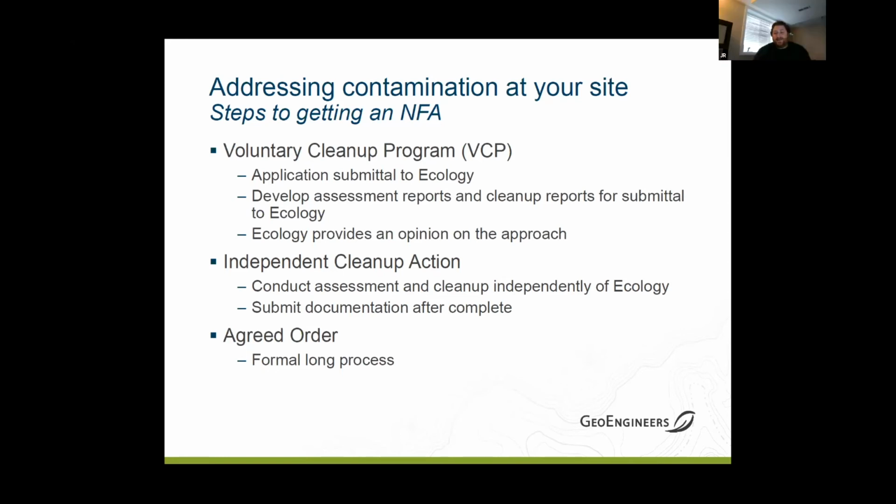Well, access to that other property can be an issue, and hopefully that's somebody else's problem, and that's over there. If that contamination is on your property, and it's not well defined, I think somewhat the burden would be on you to help define the extent and prove that it came from that neighboring property. And if you've done your phase 1 and there is documentation that says there was offsite release from that, that definitely helps. Anything else to add, Bruce?